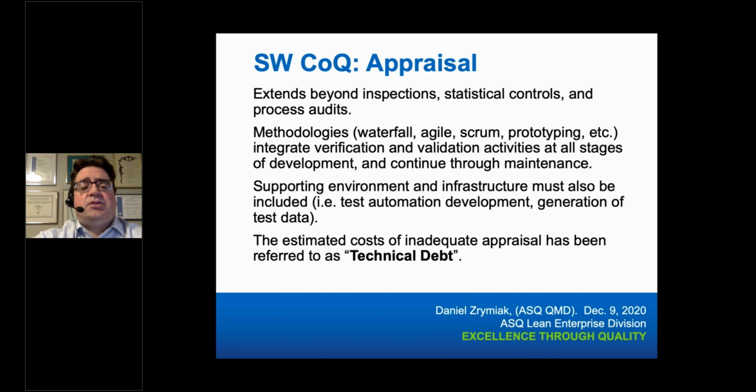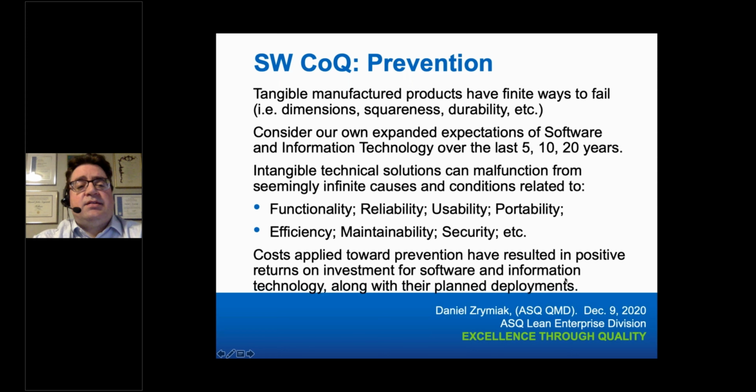And in terms of development, a term called technical debt is frequently referenced as the value if there's inadequate verification in the solution, then eventually those quality problems will have to be resolved later on. They're inescapable. So strategically, how much of the technical debt do you want to resolve prior to product release? And under the cost of quality model, you'd truly want to eradicate the majority of this technical debt while your solution is within your control before it gets released to the public.